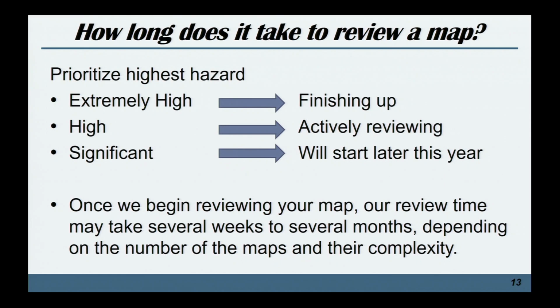So how long does it take to review a map? We are inundated with inundation maps, especially with the high hazard deadline just passing. There are almost 500 high hazard dams, and each of those dams has at least 1 map, if not more, if they have critical appurtenant structures. So as I mentioned, we're actively reviewing the high hazard maps, and probably later this year we'll start in on the significant hazard early submittals that we're receiving. Those maps aren't due, according to the Water Code, until January 1st, 2021.